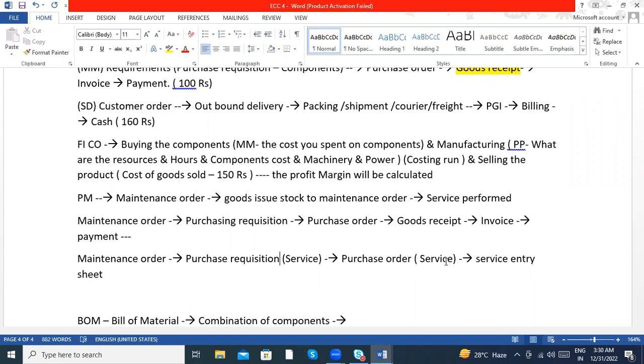The second activity, on top of that, they have to do the first coating. Then the third one: wherever it is required, they have to close the blocks. That is the activity. The fourth activity is the second attempt of the painting. And finally, they have to finish all the corners wherever required. So I just divided it into five activities.